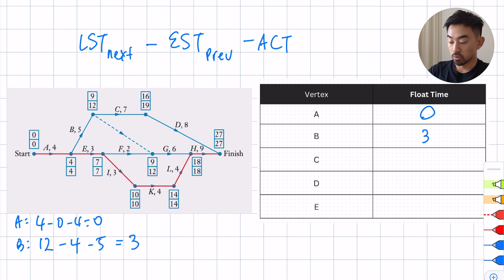Let's look at C now. So C is here. I look at the next activity, the next late is 19, so 19 minus the previous early which is 9 minus the activity which is 7. So 19 minus 9 is 10, 10 minus 7 is 3. So C is 3 as well.